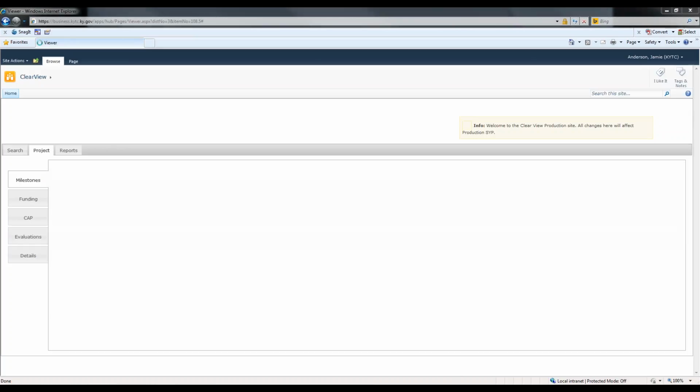The projected remaining cost table is where you update your current cost estimates. There's a couple fields that you'll need to fill in when you're updating your estimates. There's a date of estimate text box. This will be the year the estimate is being updated. Right now, this field only populates the year, so it would say like 2015. We would like this to populate the full date format. Right now it will only allow the year, so you only need to put in 2015. Then you would put in the new cost estimate. You will key in the projected year of authorization, and you will put a remark such as updated estimate based on a joint inspection meeting. The system will automatically escalate the cost based on the projected authorization year.